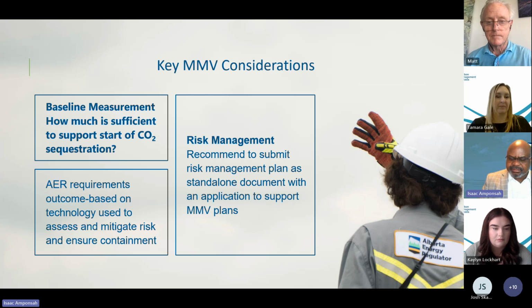So as the AER reviews the application, we'll be looking at what risks have been identified, what mitigation measures have been proposed, and are they adequate? And if we are not satisfied with what has been proposed, then we have to go back and forth to the companies until they make changes to their plans or their risk profile before they can get the scheme approval.